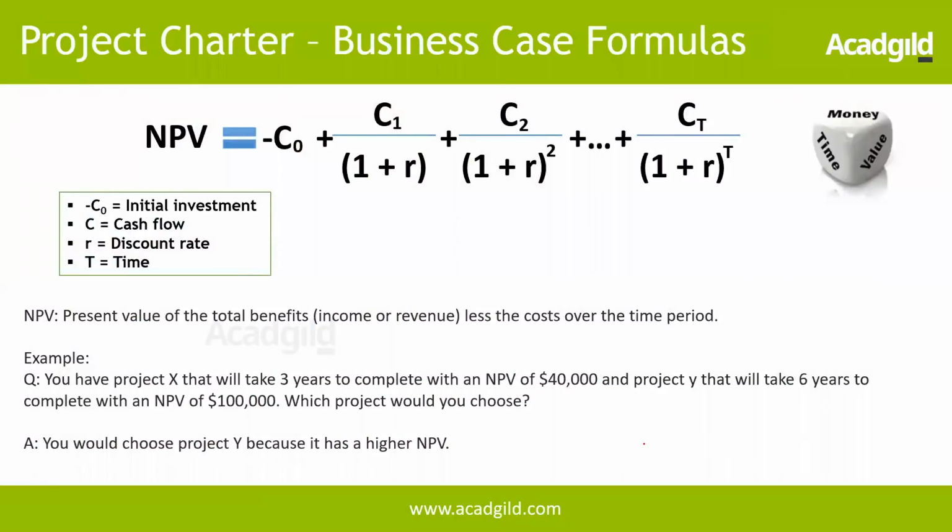So we need to use the formula, which is calculated like this: present value for year n is future value for year n divided by (1 plus r) the whole power n. So what is n here? N here represents the year for which we are going to calculate. The future value is the value that we are forecasting, and r is nothing but the discount rate here.